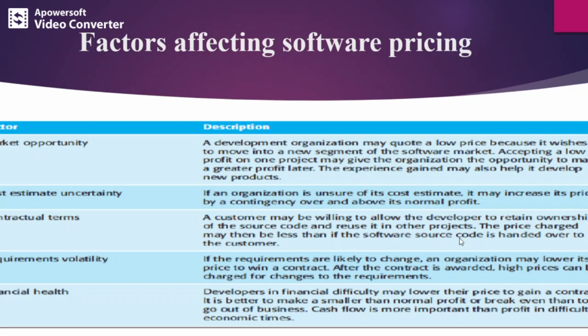Now suppose you think that the requirements keep changing. At that time, an organization can put a low price on its product to win the contract. And once it has got it, it can charge some extra prices, that is, if some modifications have been done.